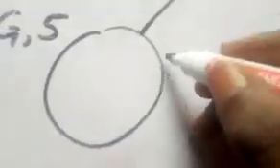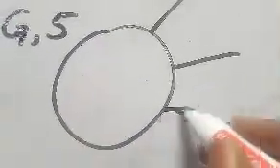So to draw this, you see you have the predecessor. That means A has a predecessor none, B none, C none. So that means they are concurrent. Concurrent simply means they are in a junction like this. That means they come out from a particular junction like this.